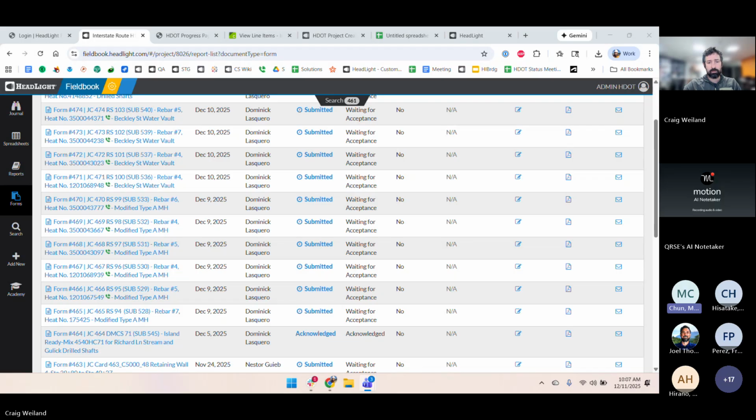where you have every sample card accounted for, the ones that were rejected and then superseded, the ones with special conditions, maybe it was submitted, approved, but then no product was used. So we could explain to the lab, or maybe something was rejected, but then that product wasn't used anyway.